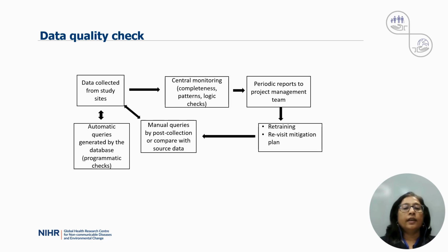But any way you do it, you should give periodic reports to the project management team. Even if you do central monitoring, you have to give periodic reports to the management team so that you can update your strategy of central monitoring, or they get feedback of how the data is looking. A collated data set will give very different information than looking at individual forms. And that is why central monitoring is very powerful.